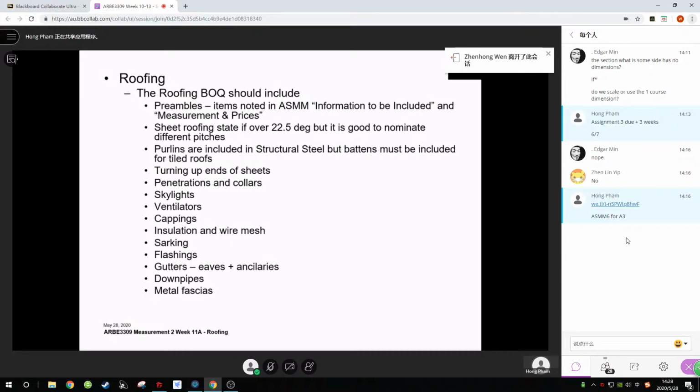So you're asking yourself, your skylight is a glass fixed to structural steel frame. Does it include the structural steel frame, or is the structural steel frame measured separately in another section? Most of the time, structural steel is another trade itself, and covering is another trade. It is another section, so there are two items to add together.